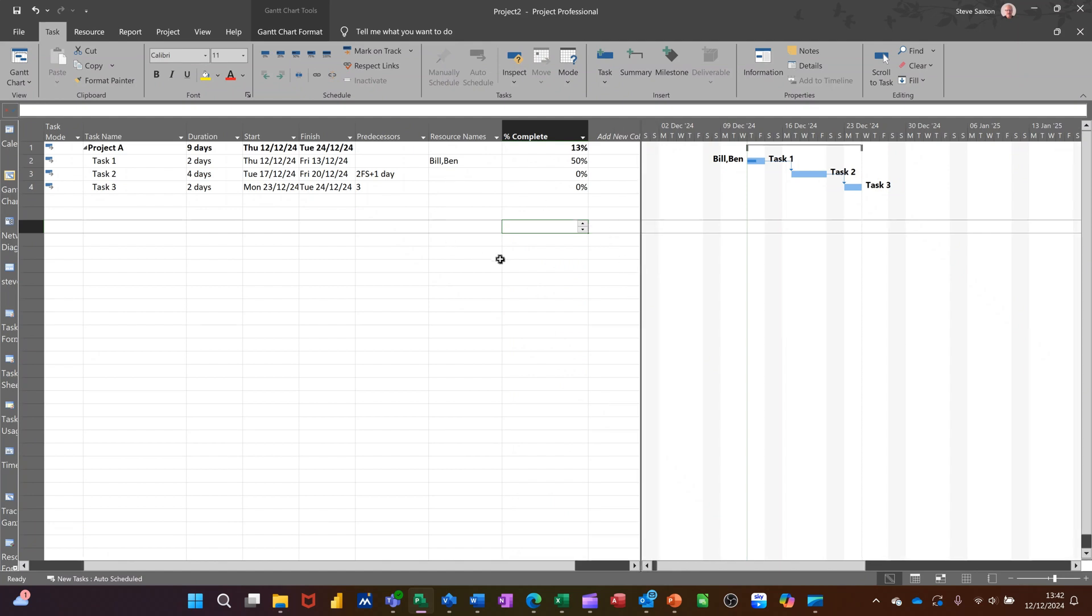So when we come to Excel, we've got a whole different ballgame, really, because Excel needs quite a lot of formulas and things to achieve what we're doing here. Where we're just dragging and dropping in these two programs, in Excel, we're going to have to create a formula to get it to work and use conditional formatting to get it to color up as well. So that's what we'll look at next. Excel.